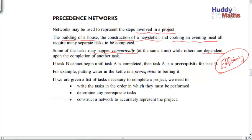So if task B can't begin until task A is completed, then A is a prerequisite, there's a word, required to be done before, pre. So how do we do this? Well, putting water in a kettle is a prerequisite to boiling it. So how do you do it? Well, let's list the tasks to complete the project, write the tasks in the order they have to be performed, determine any ones that have to come before the others, and then do a network. And then we have a plan. Good to have a plan if you're doing something fairly complicated.